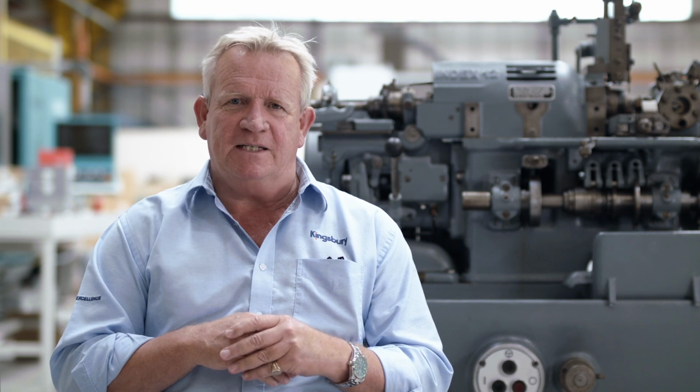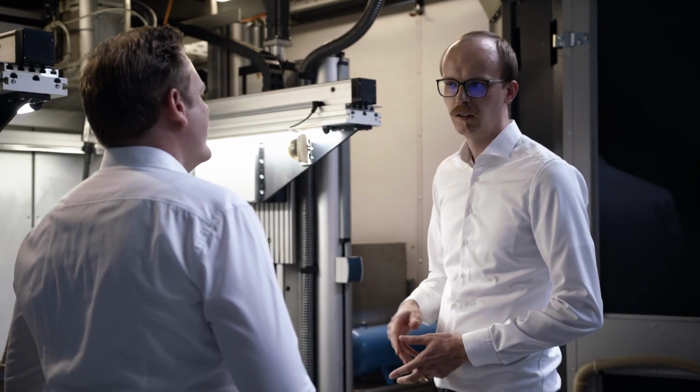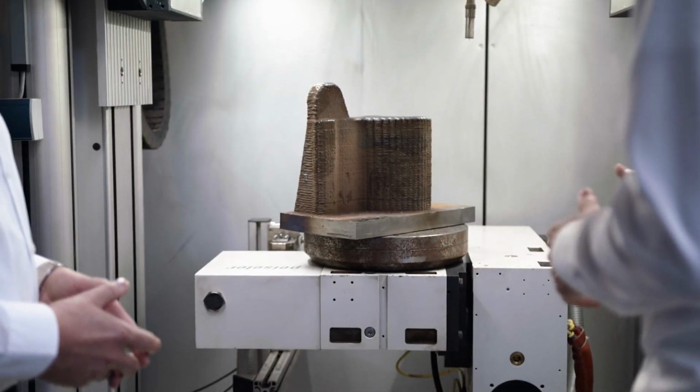In the interview with Herr Lichter from Deutsche Bahn earlier in this film, he described how when faced with a 10-month lead time from their normal conventional route of supply, they looked at an alternative way of making this part. Their pursuit of a GEFERTEC solution effectively reduced that lead time, cut it in half. But it's important to note that this was the first time they'd gone down that route. So there was a lot of investigation and development and design of processes before they could realise the completed part.